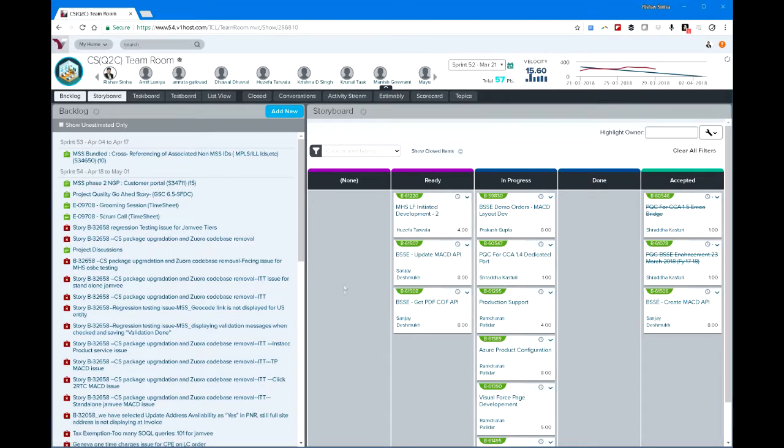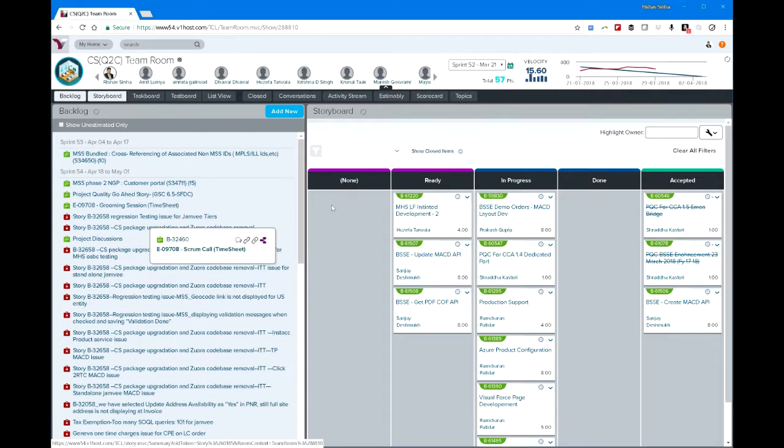You can see during the sprint or at the start of the sprint if the backlog is already created and posted in a sprint, the future of this particular sprint. Then you can prioritize by moving that particular story in this sprint or moving it out of this particular sprint. So if you want to move something from backlog to here, this is how you do it.